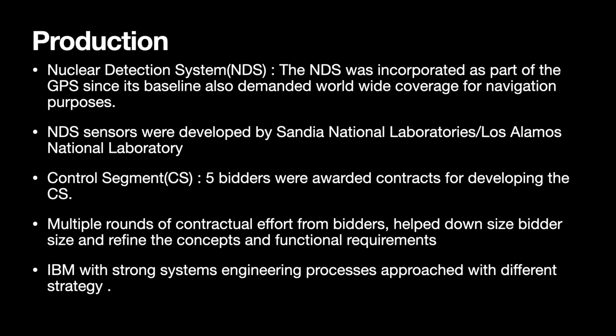The two paths that it chose were A. program management and B. a tech group reporting to the director of the program. Originally, the estimate of the size of the control segment software was 300 to 400,000 lines of code. However, the final size of the code reached 1.1 million lines of code. Earlier software releases of the control segment allowed operational capability to be achieved by 1985. 1986 to 1989 saw a period of software improvements and fault resolution.